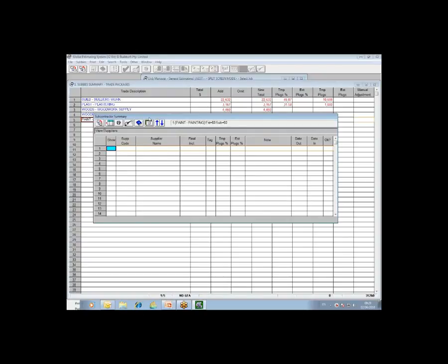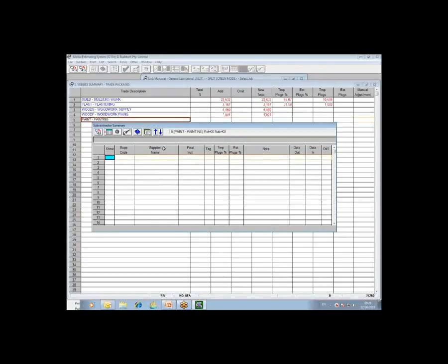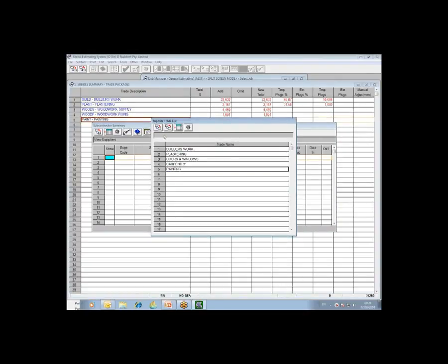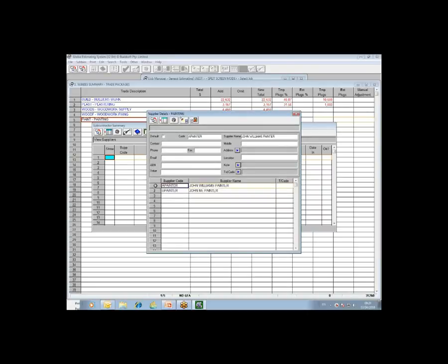So the first thing you must identify in here is who from your supplier subbie list is going to be quoting on this particular package. So what you do, again, as with the previous level, you can click on the View Subbie Database, which I'll do. I then select my trade painting, drill down. I can highlight the subbies that I want, and now you may have a large list, so if you want to